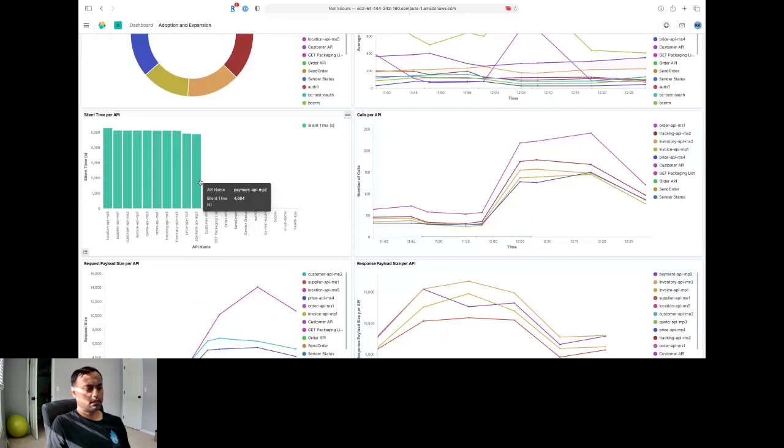And this is the last piece I'm going to show. This is all around the cost. So cost to build an API, we're pulling that out of Jira. Real cost versus estimate, again coming out of Jira. We took a blended rate, obviously multiplied by the number of hours. Defects per API, open versus resolved, and